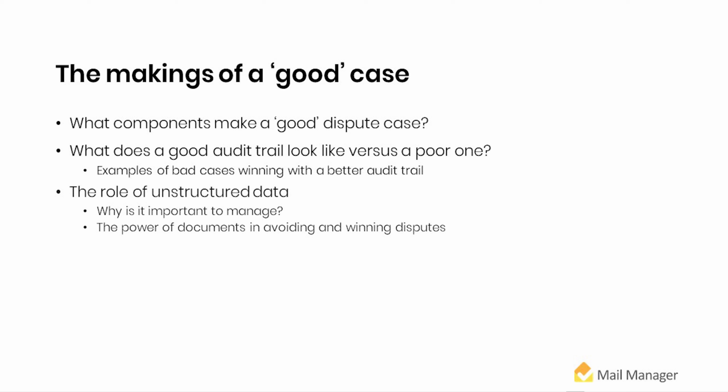Then you've got the more you structure the data, that really just means formalizing what you call things, finding key classifications. So agreeing that you will ideally follow an industry classification system, because that can be picked up with technology and platforms. But in a worst case scenario, it should just be something that's common throughout your project. So if you call this element this over here, you call that same element by the same name everywhere else when you reference it. Then if you need to find information about that element, it's like Google, you would type it in somewhere and all of the references to that can come up. Or if you want to take it to a much simpler step, you open up your Word document and you do a word search, and it's there.